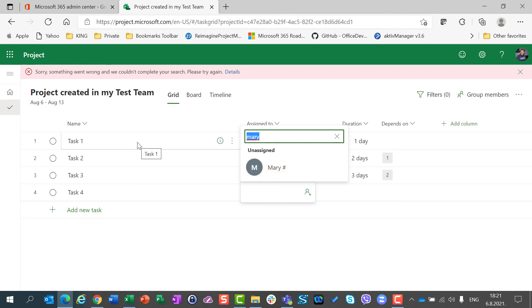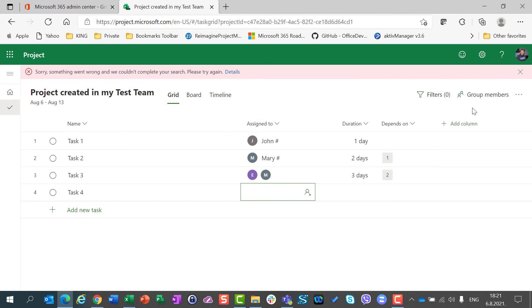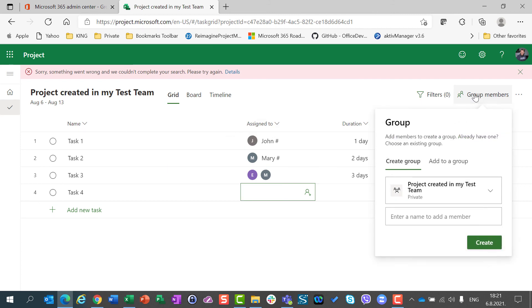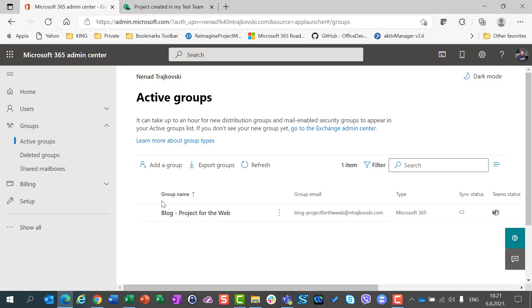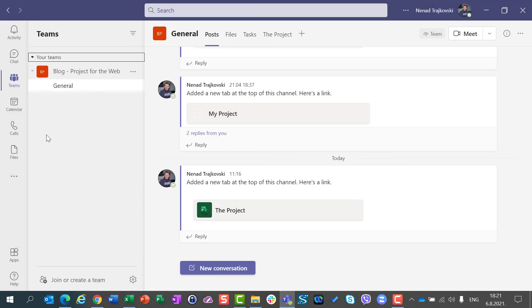And I am going to show you that in my next video. But for now, be aware when you delete the group, you can see here group is project created in my test team, but this group doesn't exist anymore because this team doesn't exist anymore.